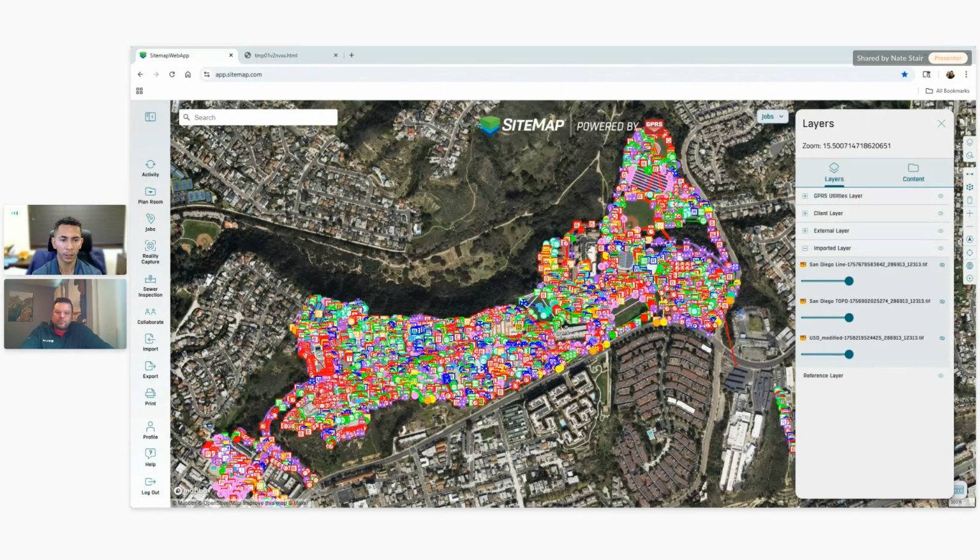And if it was just overall, we'll call it understanding of one utility, it worked. But when it was coming down to actually getting into construction, there wasn't any, we'll call it geospatial data associated with it. It was just a PDF that didn't have any scale on it, so you couldn't convert it in a PDF reader to say, oh, 1 inch is, we'll call it 12 feet or whatever it is. This was just a pure kind of map that just gave you the overall view of, we'll say, the electrical grid that we have on campus.